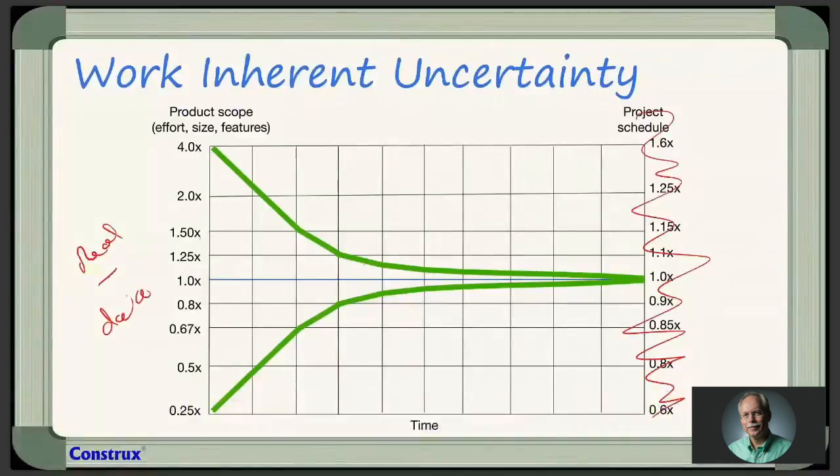on this side. The real data is on this side, so don't worry about the project schedule side too much. There is some rationale for that, and if we want to get into that in the Q&A, I can explain it. But the idea is that professional estimators, when they were thinking this is going to be a 12-month project, 12 months of effort, could be off by a factor of 4, easily. And it wasn't because they were stupid or bad, but because of the inherent uncertainty.